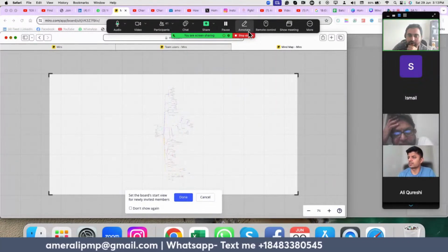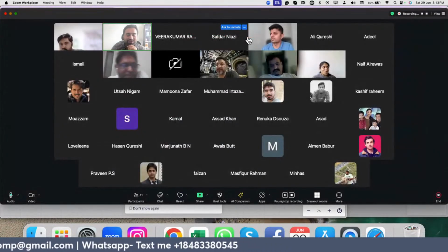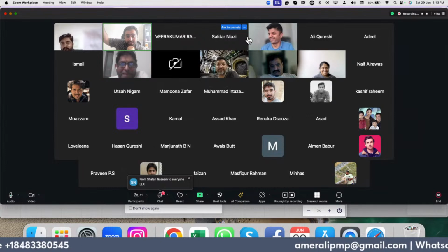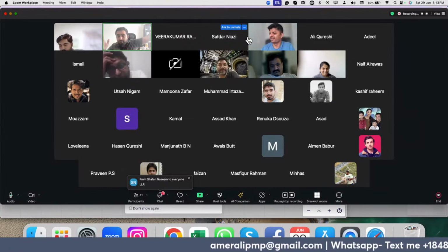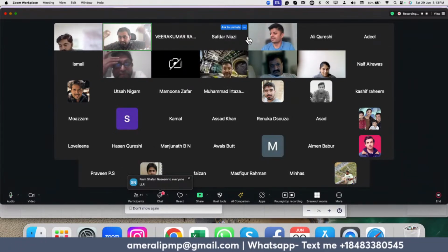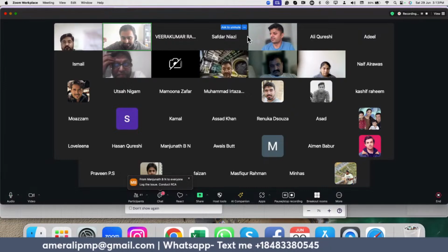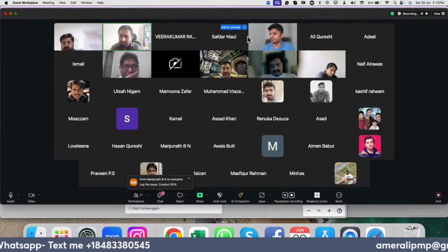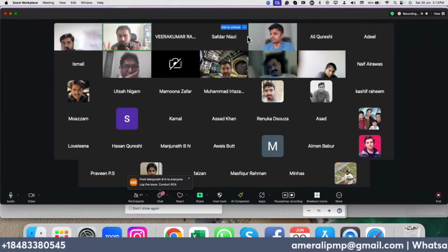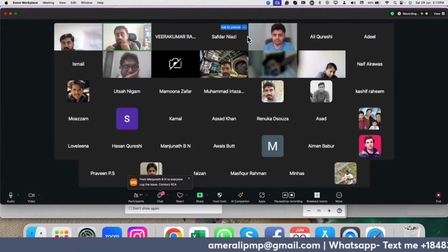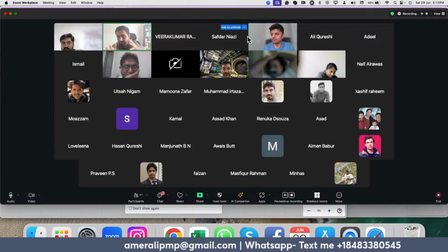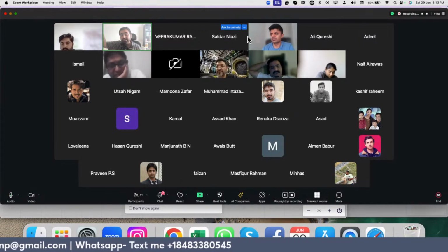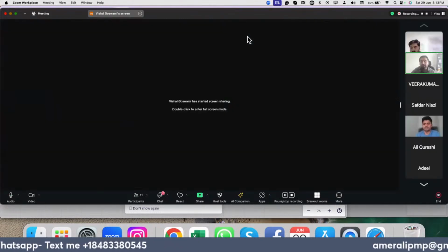So now where will we document it? In the lesson learned register for future projects. But if we had team number 5 or team number 6, then it would go in the risk register. So we did the RCA. What was the RCA? Internet was a challenge, right? We updated the issue log. This can reoccur in our project, but it cannot occur in our project, so we will not put it in the risk register, but it can occur in the next classes. So we'll update the lesson register.